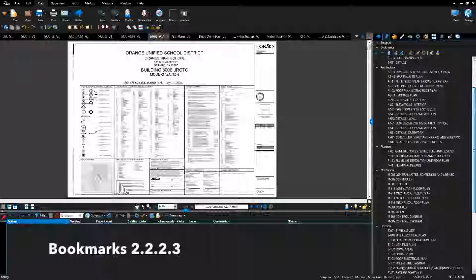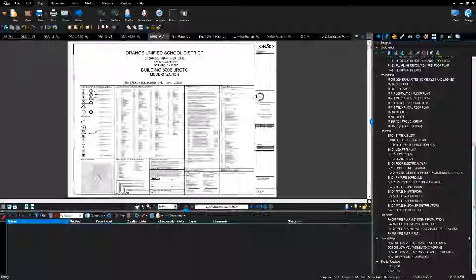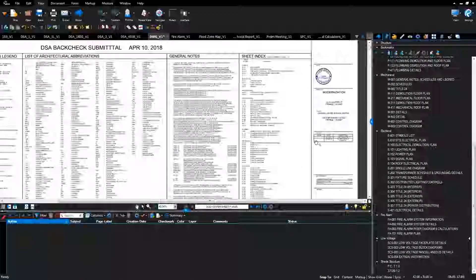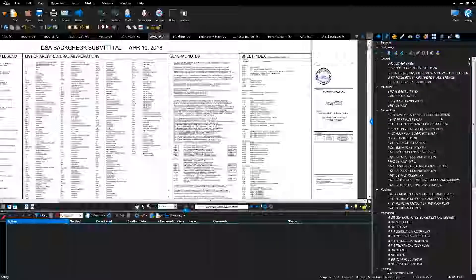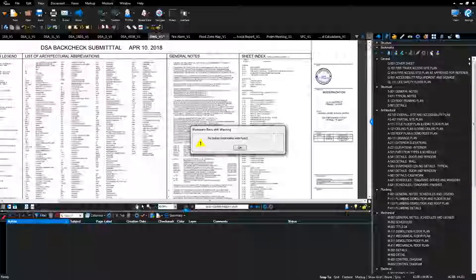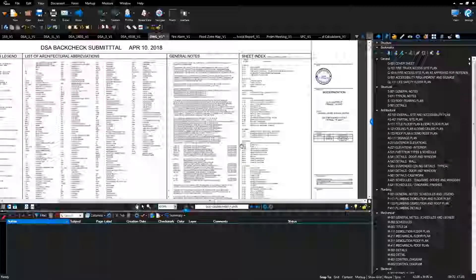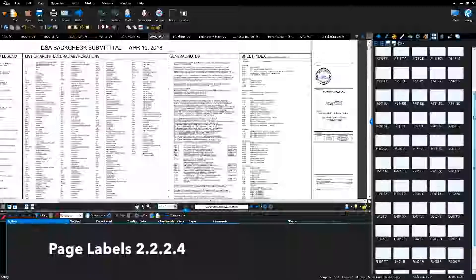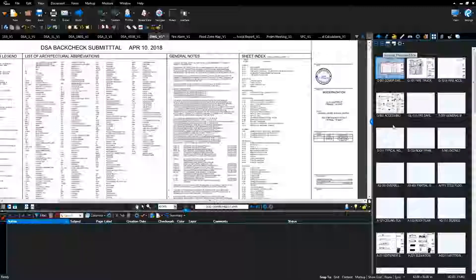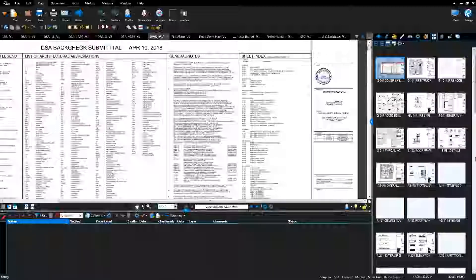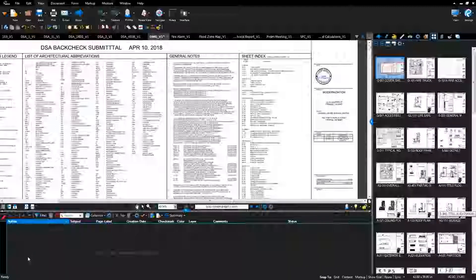View bookmarks and confirm the bookmarks match the index sheet of the drawings. Click the audit bookmarks button to verify that there are no broken bookmarks. Confirm page labels are on each of the sheets and that they match the bookmarks, including sheet number and sheet name. Confirm that the document has been flattened and there are no markups in the bottom markup list.